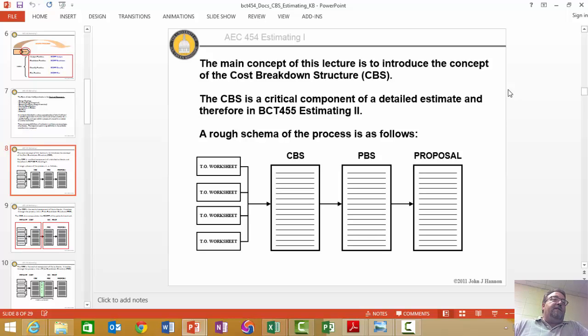For the estimate, then you have your activities for the schedule, then you have your cost items become pay items, and you can use that in the proposal and or to get paid by and to track the work, your schedule of values. That's a methodology I believe in. You can use that as part of your project controls and basis of estimate methodology.